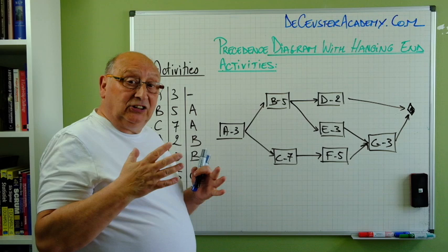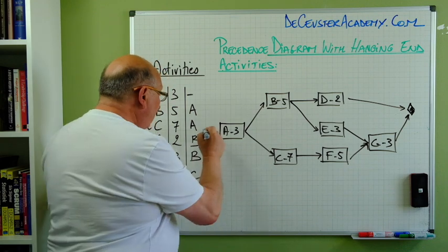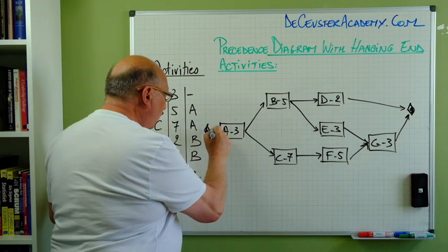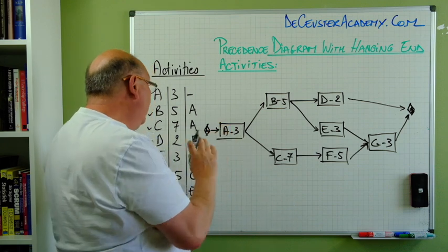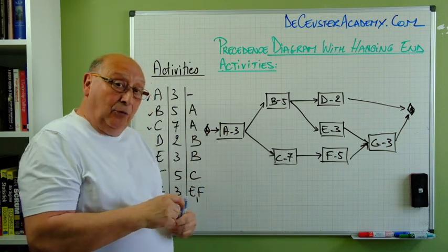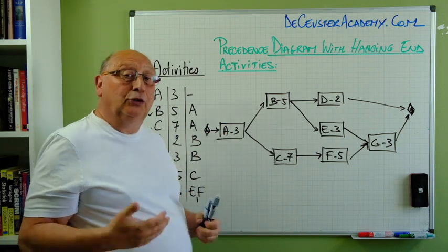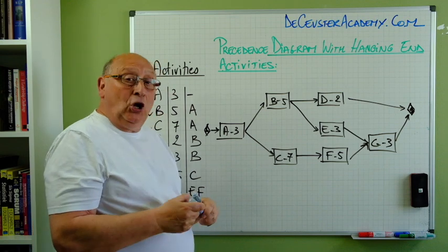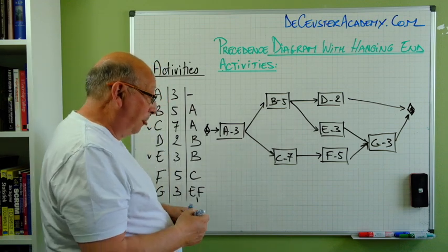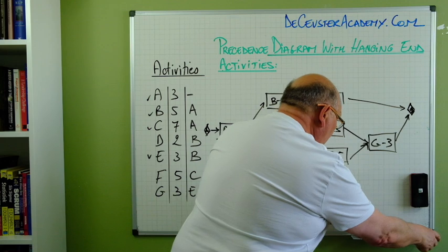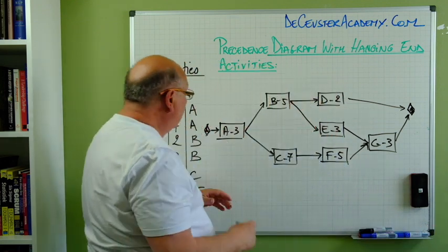A milestone is an event in time. We can also draw a start milestone here, but we don't count the time. And typically when we use a precedence diagram, we start counting from 1. So let's do that, and I take green to do the calculations.